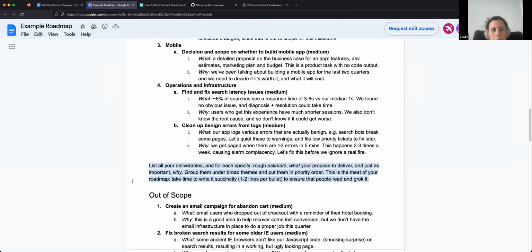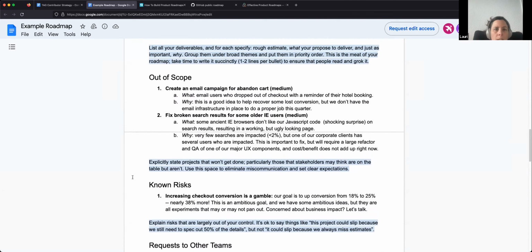And then if you scroll further below, it just tells you how you list the deliverables and what to specify, and we covered that. And then this is really important too. I think any good roadmap tells you what is not in scope and what is not being worked on. So knowing what you're not building is very helpful for, again, setting the boundary for your project. And it's also great information to communicate to contributors because then they won't come with a lot of feature requests that are just not useful, not what you're looking for.